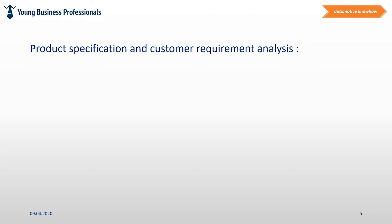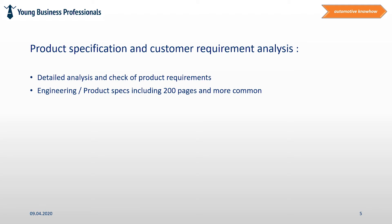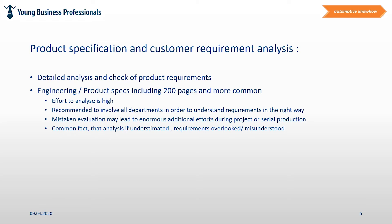Product specification and customer requirement analysis. At the beginning of each RFQ phase, it is useful to create an overview of all customer requirements. This is of special importance as it is a common fact that requirements won't be analyzed in the right way or won't be recognized at all. If the design of the product is not considering them, this might cause mistrust but also cost issues later on. In many cases, customers are providing specification sheets with more than 200 pages and it typically takes a lot of effort to analyze them in detail. It is wise to include all functional areas in order to divide the effort and also to make sure technical requirements are understood in the right way.